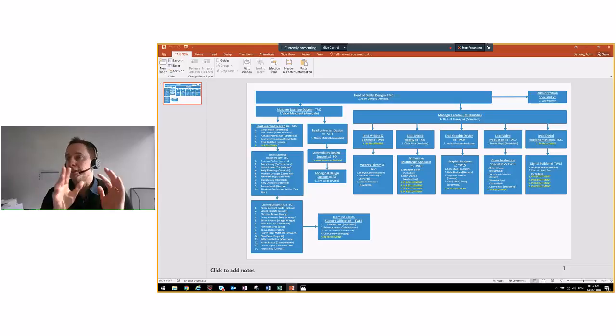So they'll oversee the scoping activities and help us pull together a project plan. My team will provide input in terms of the production effort, the resources required, potentially some guidance on the design approach, and the enabling technologies, timelines for delivery, and so forth. So that's essentially how that entry point into TAFE Digital will work. And then once that's all defined, it'll come into the digital design team to make the content, essentially. So that's where we fit in.